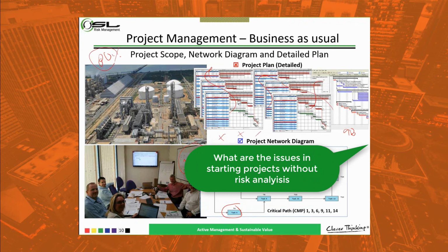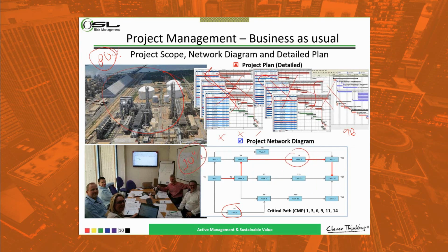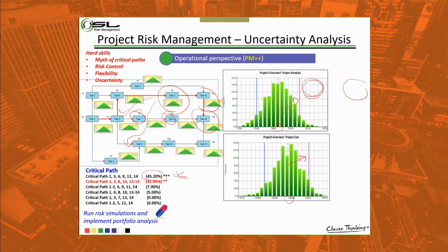In 80% of the exposure to project management, the traditional way is we have the project and immediately we jump to the detailed plan. The sooner you do that, you are jumping really quick to do this strategy, and you are forgetting the interrelation of these activities. You are increasing the likelihood you are going to overrun on time. When the organization doesn't sit down a little bit to understand the risk and try to quantify, even to get the approval to go ahead with the project or to start monitoring the project during the process, they are increasing the likelihood of making the project run late.